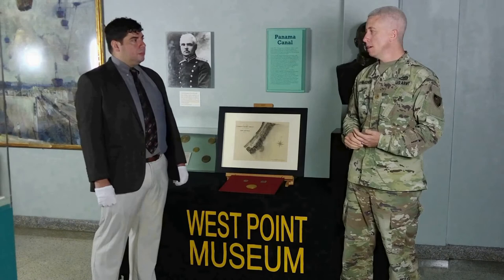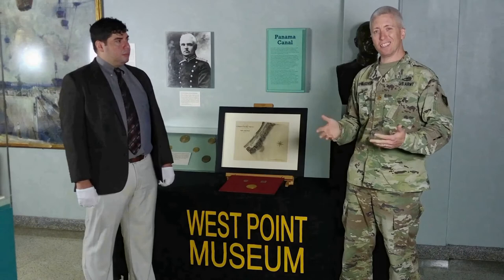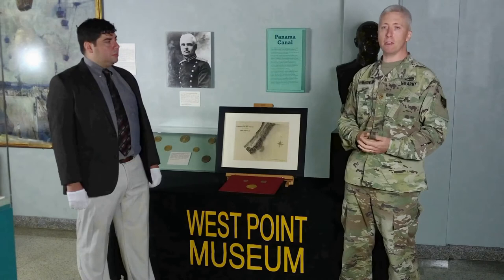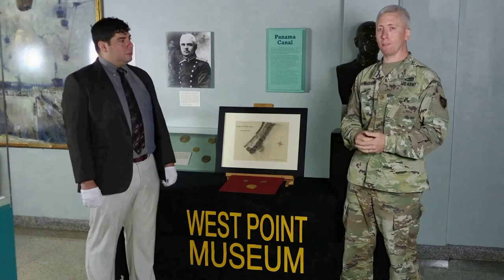Quite famously, he would open his house and office every Sunday morning. They called it Sunday Morning Court. Anybody who had any grievance could come to him and air their grievance. If he believed that their complaint had merit, he would launch an investigation. He had an entire subsection of his headquarters staff that was devoted to investigating workers' complaints.